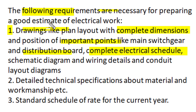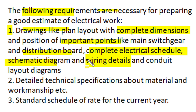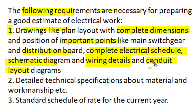Apart from that, we must have a schematic electrical diagram of the installation and wiring detail, where the size and number of wires required for electrical connections should be mentioned. We must also have a conduit layout tube diagram that suggests the pathway for wires. Based on these available drawings, we can make a good estimation of electrical work.